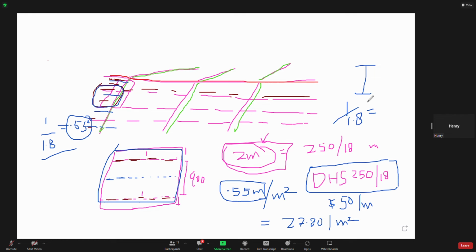Oh yeah, yes. It's the length, not the spacing. The spacing is such that one purlin is running over here, the other one is running over there. So your meter would have a possibility of only 0.55 of purlin in 1 meter area. And that is the possibility you've calculated. So that gives you 0.55 meter per meter of steel roof.